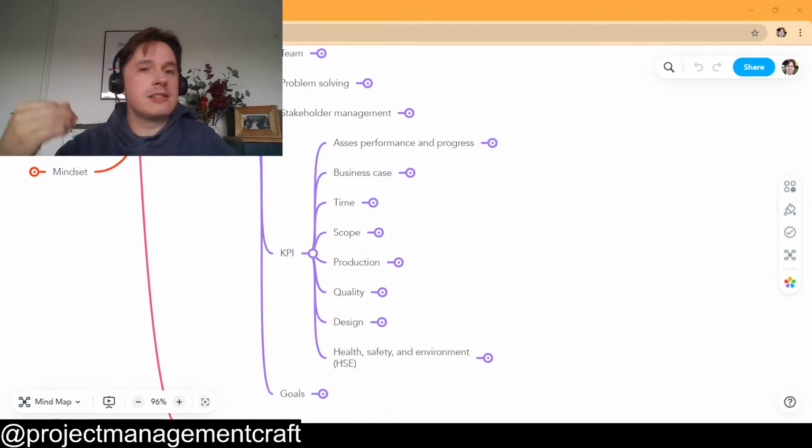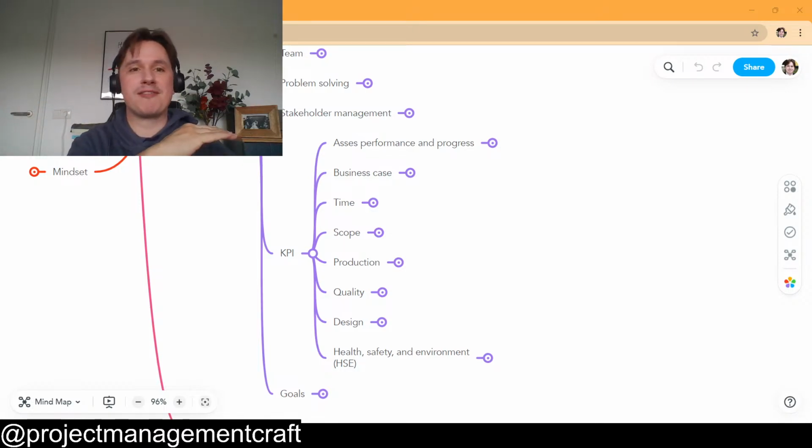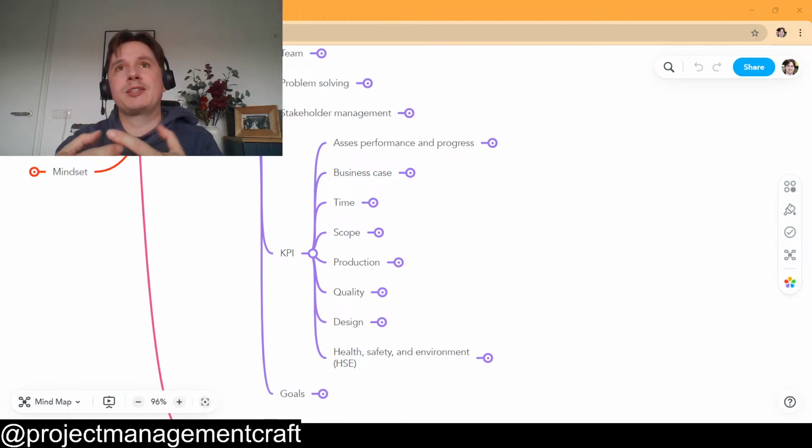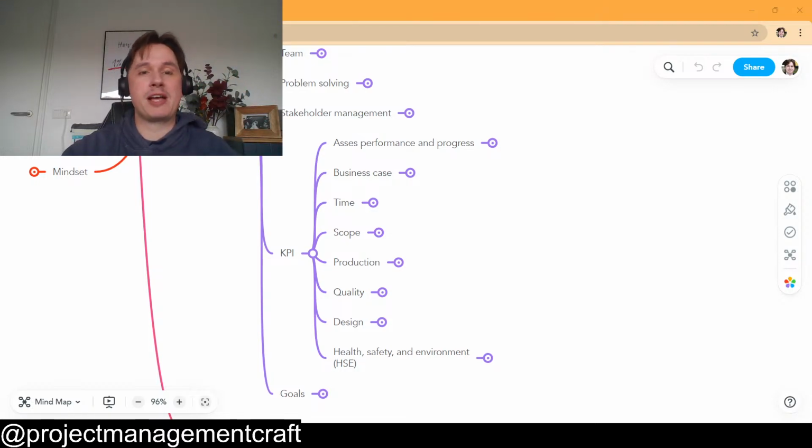So in this situation, that was ridiculous. But what did the production team want? They wanted a green KPI, a green key performance indicator. So what do you do? You set the bar very low. What did that do to the project? The costs went up drastically to produce anything, because you can imagine a 50% waste is incredibly high.